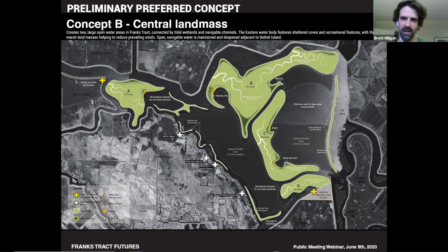I don't want to say this definitively, but everything we've looked at, if you were to construct this, can you see my cursor? An area would be taken off to create this very large feature here, maybe about 1/3 to 1/2 of the tract, but it would be done in sections. It wouldn't be the entire tract at the same time, but you'd also have to have room for where they're pulling that material from. I think it would be localized within the tract. I don't know exactly how wide, and Michelle, you might have more to say on that, but the idea is to do it in stages, so other parts of the tract would still be open. You wouldn't be fully closing off the entire tract at one time.